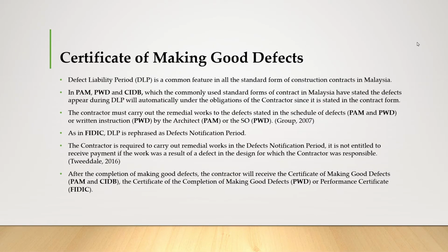So the defects liability period, DLP, is a common feature in all the standard forms of construction contracts in Malaysia. So in PAM, PWD, and CIDB, which are the commonly used standard forms of contract in Malaysia, defects that appear during the DLP automatically come under the obligation of the contractor since it is stated in the contract form. The contractor must carry out the remedial works to the defects stated in the schedule of defects in PAM and PWD, or the written instruction in PWD by the architect in PAM or the SO in PWD.